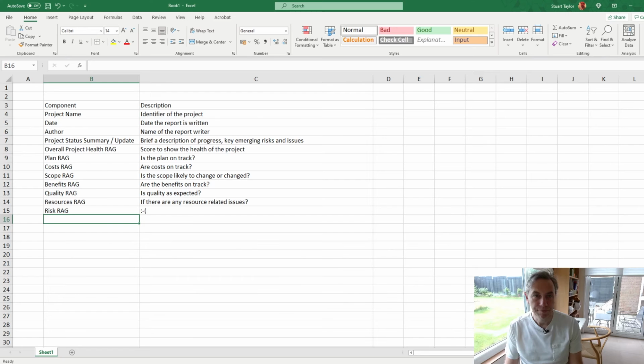Okay, the next thing people will be interested in from your status report are, what have you been doing in the last reporting period? For this, you'll include details of your milestones and your deliverables. Don't waste people's time with, we've been doing these activities and we've been busy. People aren't interested. They're just interested in the tangible deliverables that are coming out of your project. And a good place for you to get a list of those is your project plan. So this is a great chance for you to just copy and paste items from your project plan with the word complete next to each of the items.